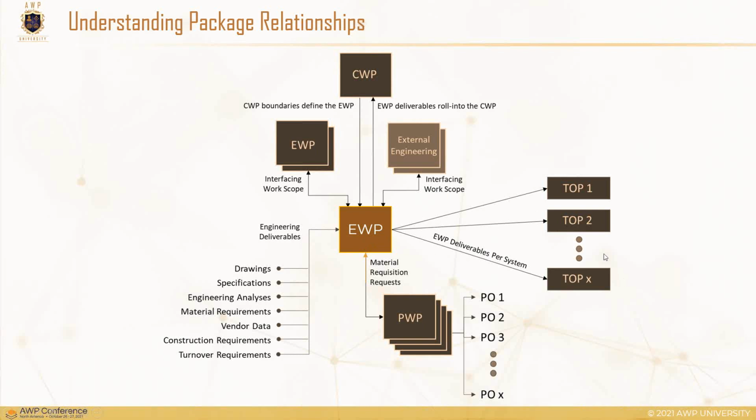So there again, that's a bit of a mapping or a web of logic ties between the turnover packages and the engineering. That's not a small thing. That is a requirement to identify the constraint relationship between those, because obviously engineering delivery of information to the field for execution will heavily affect our ability to turn it over.